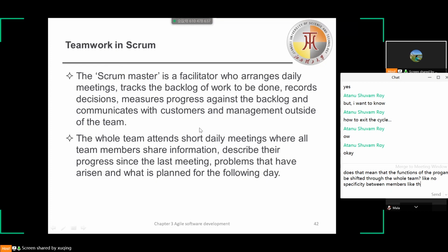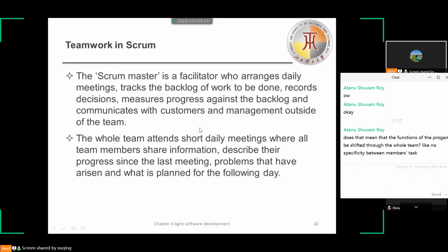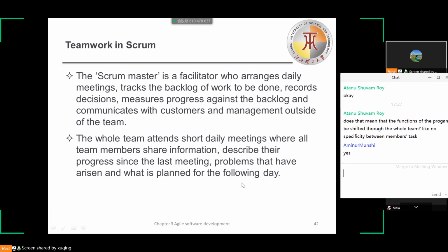This means that everyone on the team can know what is going on, and if there is some problem arising, then members can replan short-term work to cope with the problems. Everyone participates in this short-term planning, and there is no top-down direction from the Scrum Master. Like we can say, there's no manager, the notion of managers.